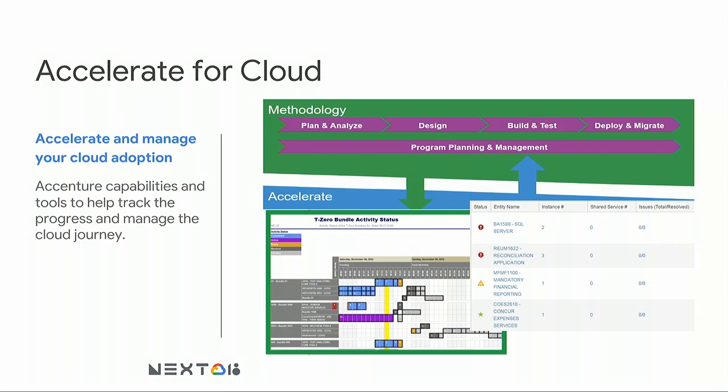And then it turns out a number of reports that allow us to go back to the business and say, here's when all of your applications are migrating. We go to individual owners and say, here are the different events that you'll have. Is that good or bad based on your scenario and situation? And then ultimately it drives through to the final migration, which is beyond planning. But it gets us down into 15-minute increments during the actual migration, where we can track the migration of hundreds of servers at a time.